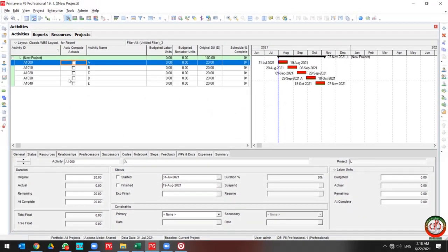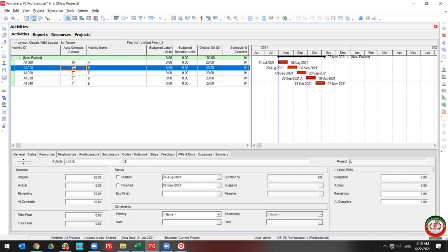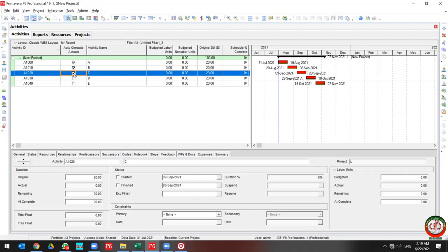I am going to add it after Activity ID. Then, if you want to use Apply Actual, you should select this Autocompute Actual. I am going to add it for the first three, Activity A to C, but for D and E, I don't update this field.